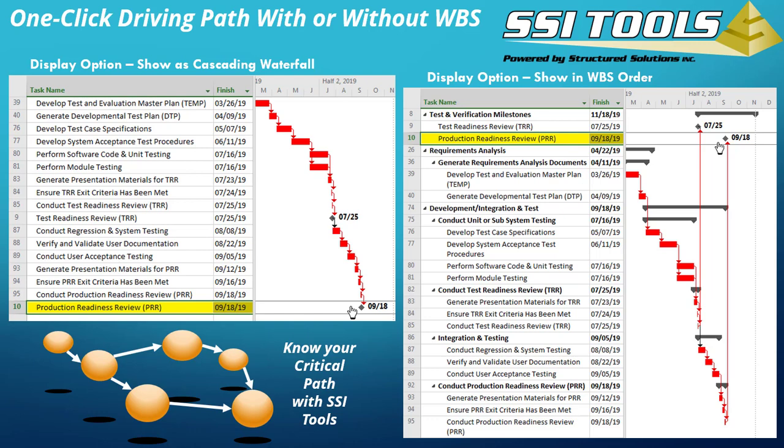This page shows two display options. You can pick display options using the Advanced Trace Tools Form. On the left-hand side, I'm showing the result in a cascading waterfall, ignoring the project's work breakdown structure and reordering the tasks according to their start and finish dates. On the right, I'm showing the same tasks within the context of the project's work breakdown structure and in their natural order. Pause the video and give this a try yourself — open the Advanced Trace Tools Form and look for the display options.